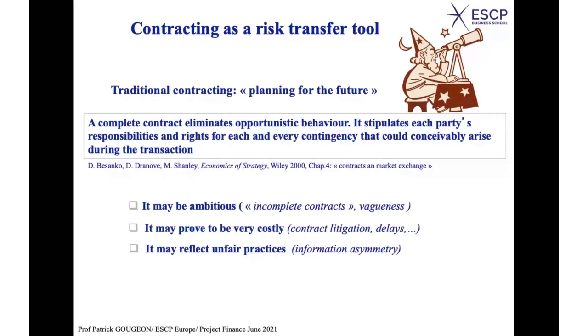And the facility manager will say, okay, no problem for that. And usually he would provide you with a good price to make sure you get the market, with a good price, and you are happy with it. Except that the facility manager, when he signs a contract, knows that there are lots of things which will have to be done, but which you as a client have not identified. And that's the way he will make money.